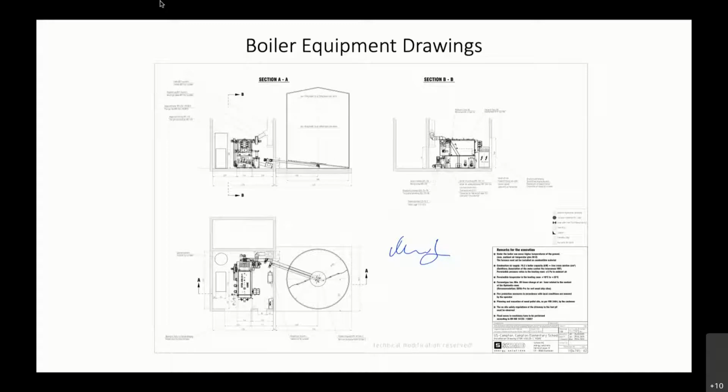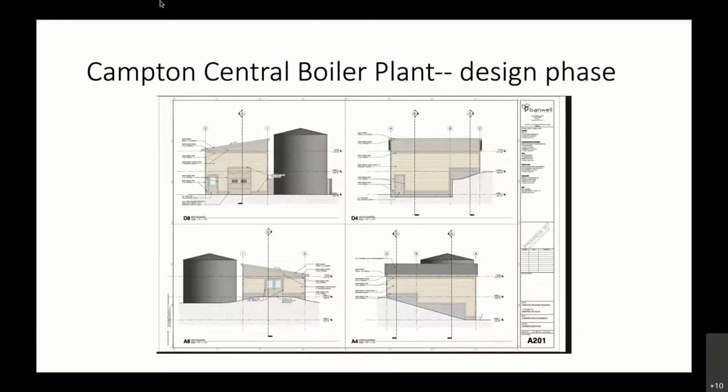And here again is also us doing the interaction with the Schmidt boiler manufacturer that manufactures our boiler equipment and also the material handling equipment. Then we coordinate the physical space from the architect with the boiler manufacturer and also the silo manufacturer and also the underground utilities. So it's a tremendous amount of coordination that gets into a project summed up on one page, but nonetheless, it sometimes can take an entire month to get to the stage where you can sign it and then they build it and then you kind of own it, because if you haven't done your homework, then that's not quite right.